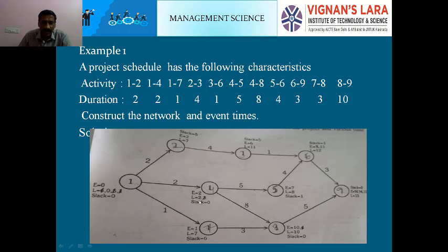Now in the backward passing method, we consider only the least character, while in forward movement, high character is considered. In backward passing method, low character is considered, high character cancelled. At event 4, low character is 2, high character is 3. 3 cancelled. Like that, all are calculated.